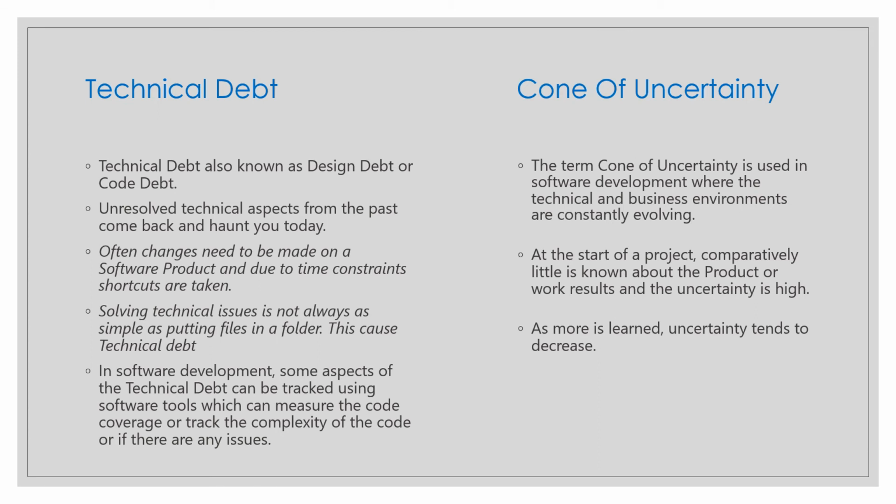The product backlog is the single source of requirements for any changes made to the product, and there should not be any misses. We add them. Non-functional requirements can be expressed as a product backlog item only, or as acceptance criteria for a product backlog item. So both options are acceptable. Non-functional requirements can go into the product backlog and into the definition of done.